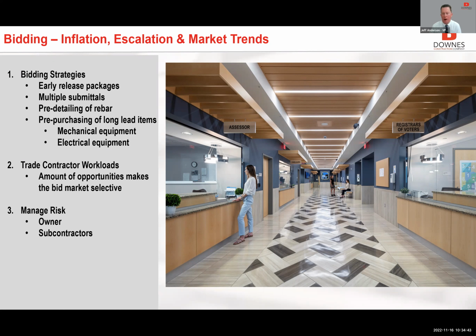So we're talking about going out to trade contractors at an early stage with the plans and specifications from your design team to solicit pricing on these things early in the process. In some cases, picking up 2 to 3 months on the overall normal process if we were to do a typical bid and build scenario, helping you on the back end. And again, the back end of the overall construction project is resulting in cost savings, obviously, because of a reduced schedule.